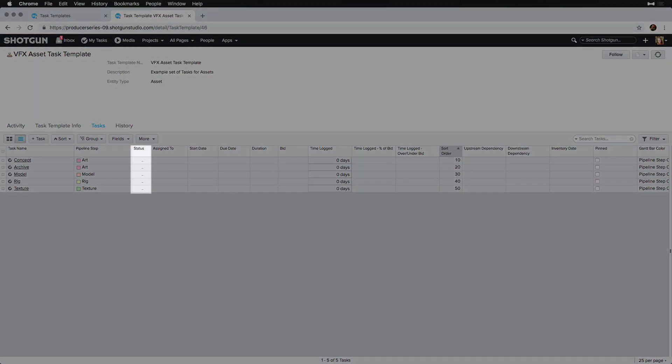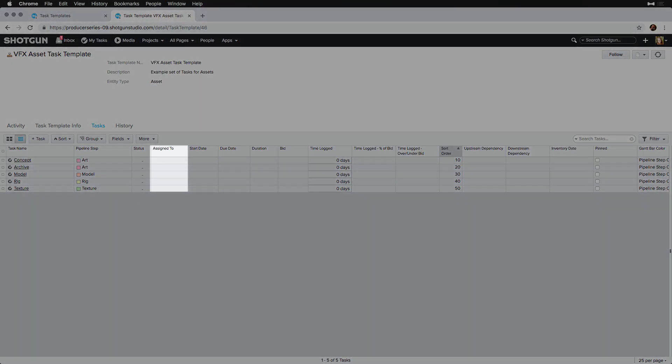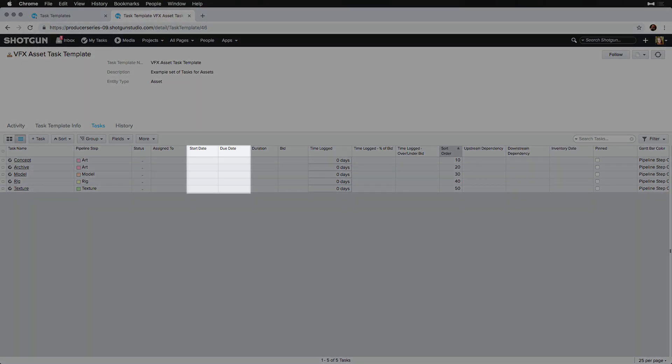The status defines the state of the task. The status can be updated as the artist works on that task. A task can be assigned to a person, people, or a group. Tasks have a start date and a due date, which will be visible throughout Shotgun, whether in My Tasks or on a Schedule page.